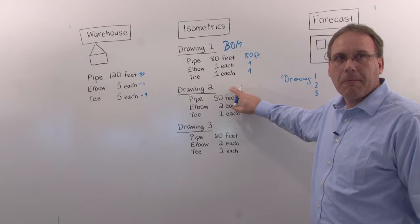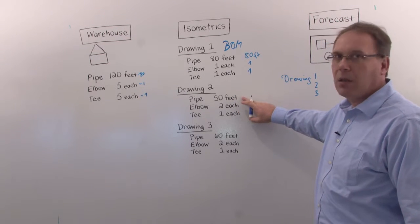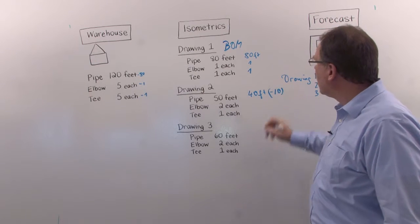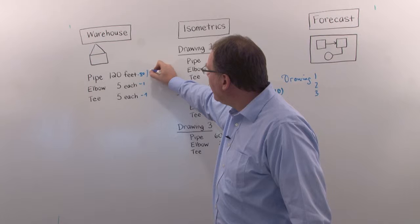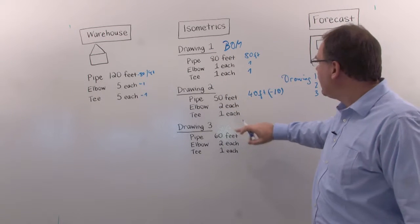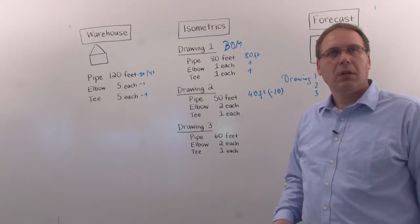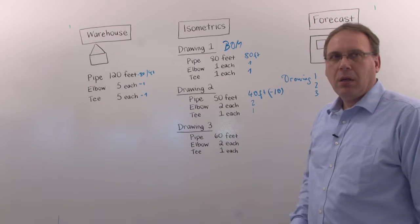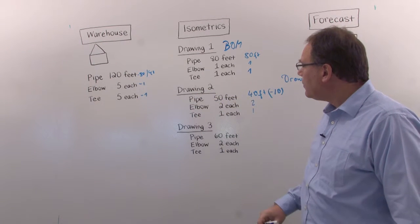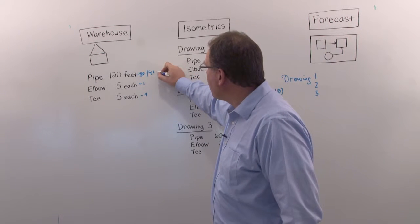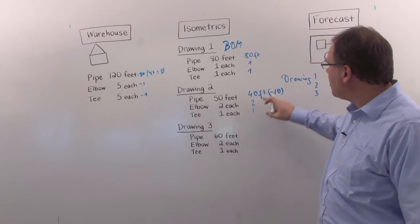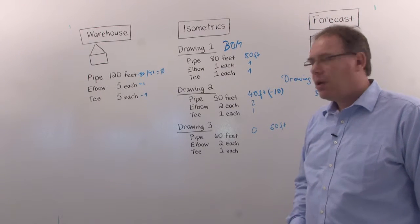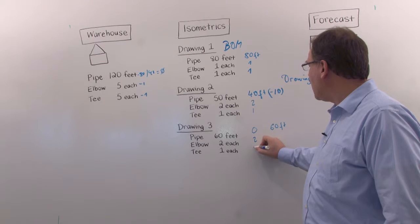So now it goes to the next drawing. So what's still left? So I need pipe 50 feet. As you can now imagine, we have only 40 feet available and we are short by minus 10. Because here is only 40 left. I need 50. I can have only 40. So 10 is short. That is the language. 10 is short. I do have enough elbows. So I have the two and have the one. So we are concentrating on the pipe in the moment to get the point across. The next is I need pipe 60 foot. But because of this, we are already at zero. The warehouse is empty. Because we consumed 40 and 80 here, it's 120. I have nothing available and I'm 60 foot short. I still have the elbows and still the tees available.